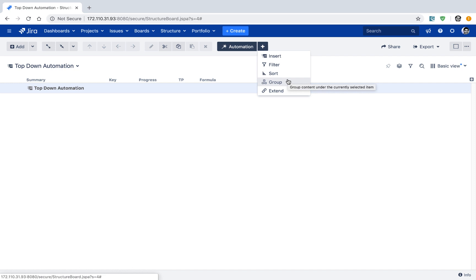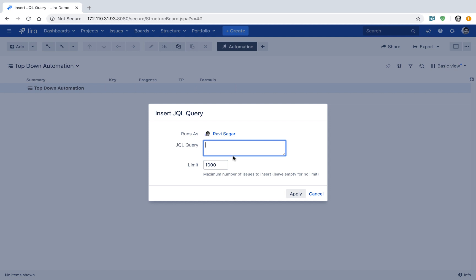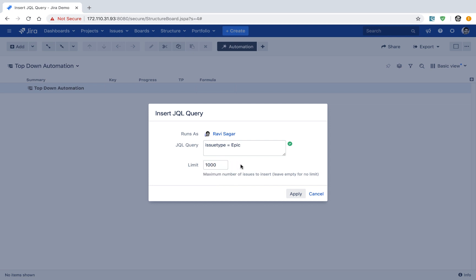We want to create a board where we can start with the epics and then drill down into all the stories within those epics, and then all the subtasks within those stories. Click on the Insert option, and you have the option to use an Agile board, a JQL query, or bring in issues from another structure board. We will use the JQL query option. You will be presented with the option to type in your JQL — type in issue type is equal to Epic, since we want to work on all the epics in our Top Down Automation board. You also have the option to limit the number of issues, which is useful when concerned about performance. Then click the Apply button.